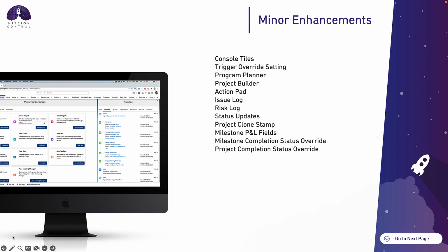So the P&L scheduled, P&L actual, and P&L forecast have all been updated to accommodate those expense fields, particularly where the billing type of the project has been set to fixed price plus expenses, or if it's being controlled on milestones for the individual fixed price plus expenses at the milestone level.